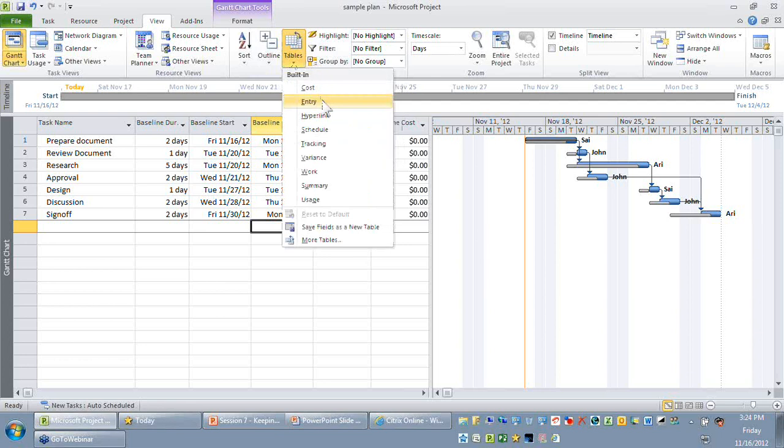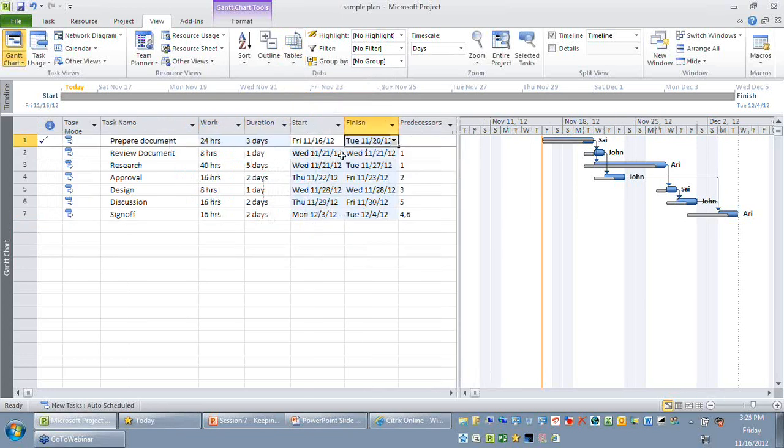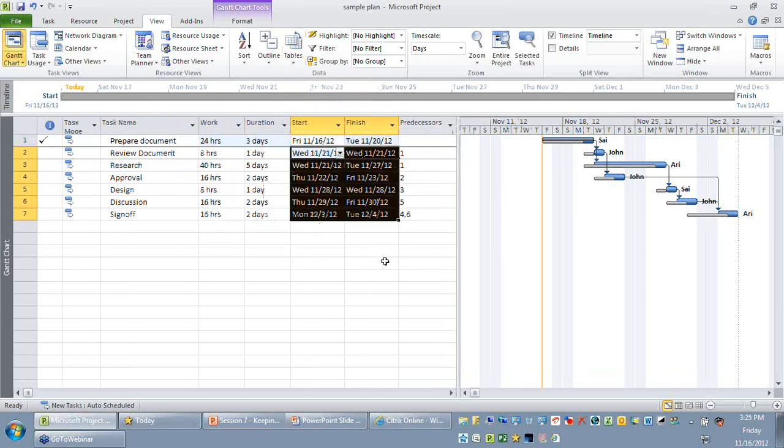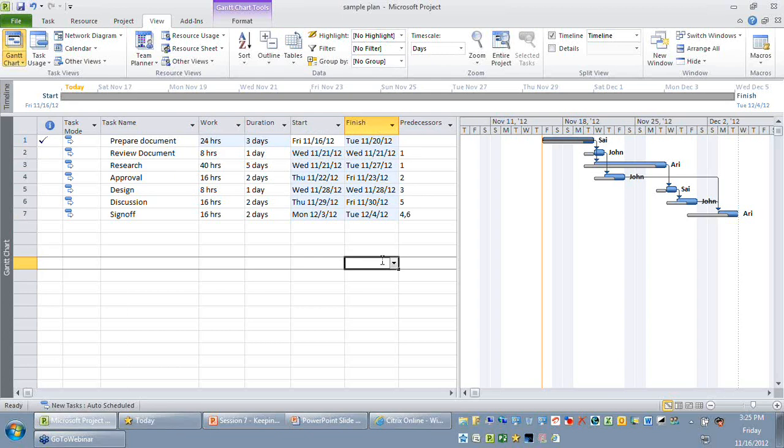So now you can see on your entry table, because the first activity got completed, its duration got revised to 3 days, and the finish date got revised. Because of the finish date, the other activity is also getting impacted. So as you can ideally see, based on your actuals, your entry table is always going to get adjusted accordingly. And this is the power of your entry table. The entry table will not be static like your baselining.